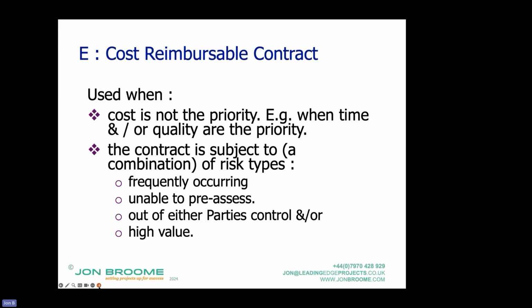A water main blows up. They don't sort of do a survey, put it out to tender, run a competition, then have lots of compensation events because what they've found is a different and evolving situation. They just get the friendly contractor in who starts work straight away. All right. And that relates to why is it time driven? Well, actually, it's because it's subject to risk and we don't have time to nail the risk. We've got to get on and do it. It's not one you necessarily want to be using because of the risk and the extra costs, but sometimes you have to. The benefits outweigh the drawbacks.